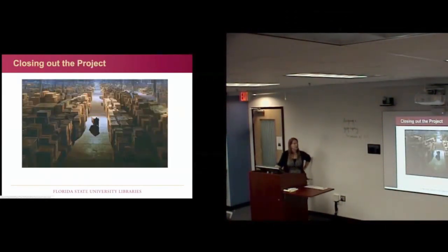And then lastly, we get to the closing out of the project. And this step will depend on what kind of project and what sort of reporting you're required to do with your project. For us, this is purely to our benefit, the steps that we take in the closing out of the project. So what I do is I make sure any documentation, the project briefing, the inventory spreadsheets, the project debriefing documents, the original proposal, any other documentation that involves this project at all gets put into a single location. For us, it's SharePoint. That's what we use here in the library. And I also, and it's one of the reasons we use the project management tool that we do, I can create an archive of the list of tasks, subtasks, and any notes that were put in there as well, and put that with all the project documentation as well.